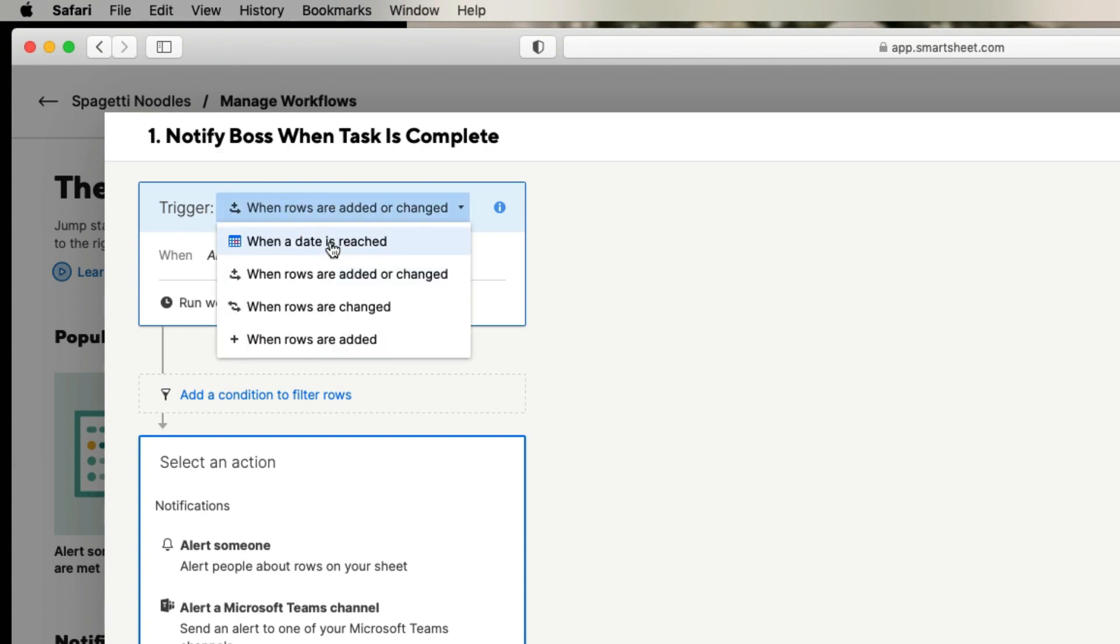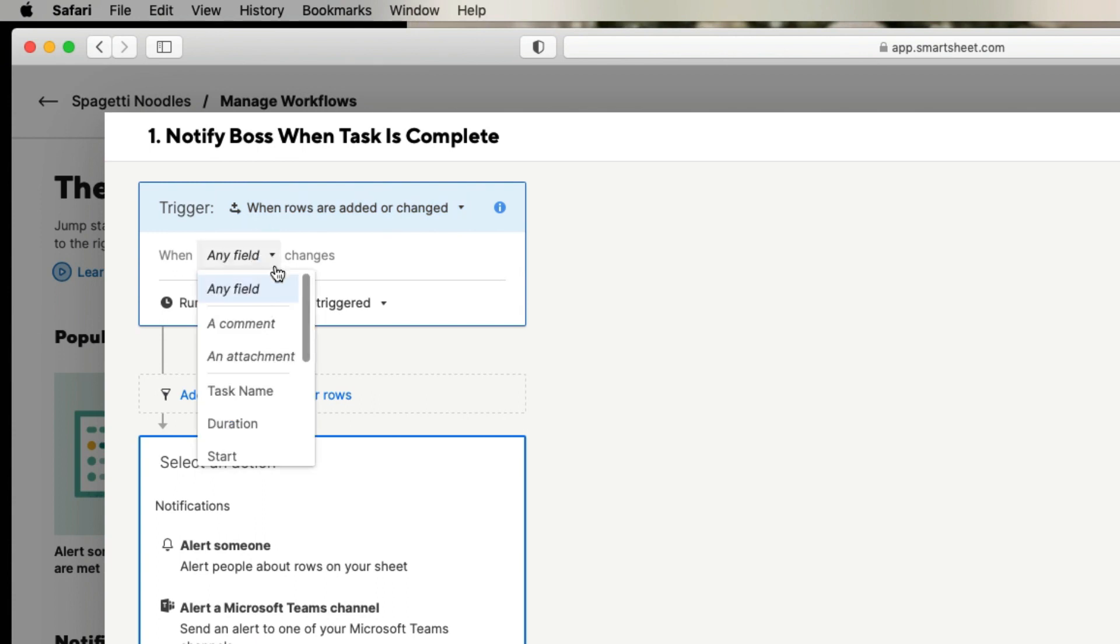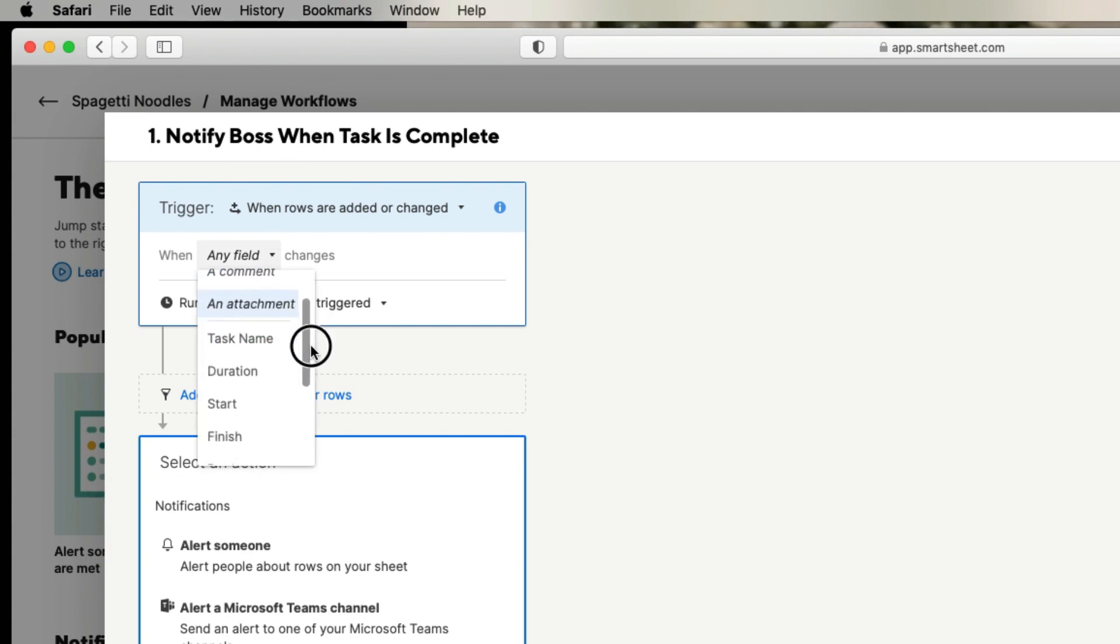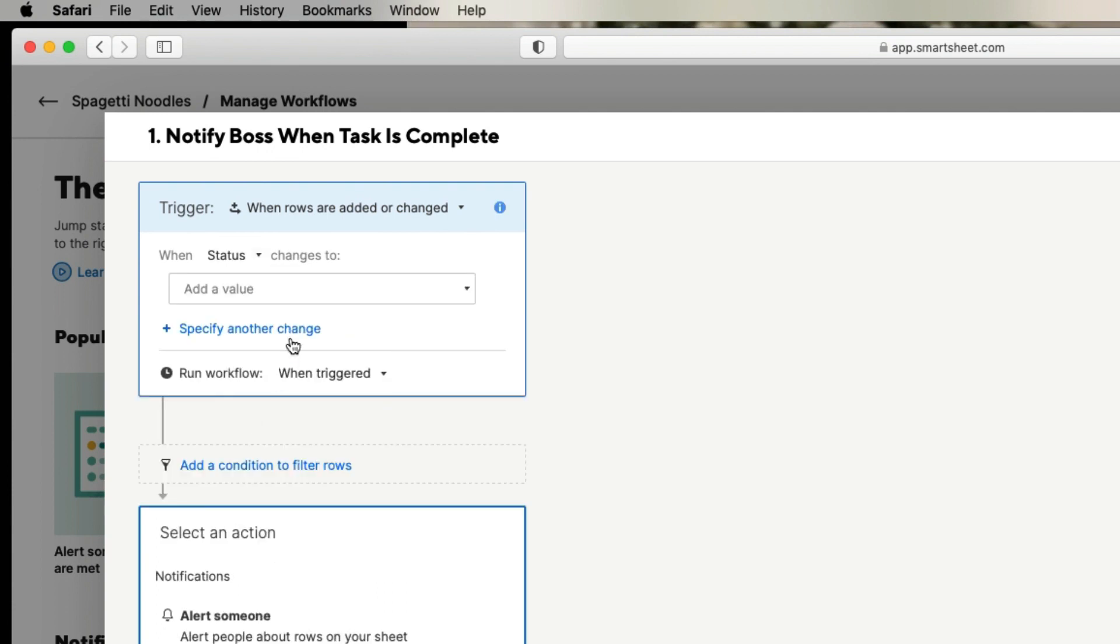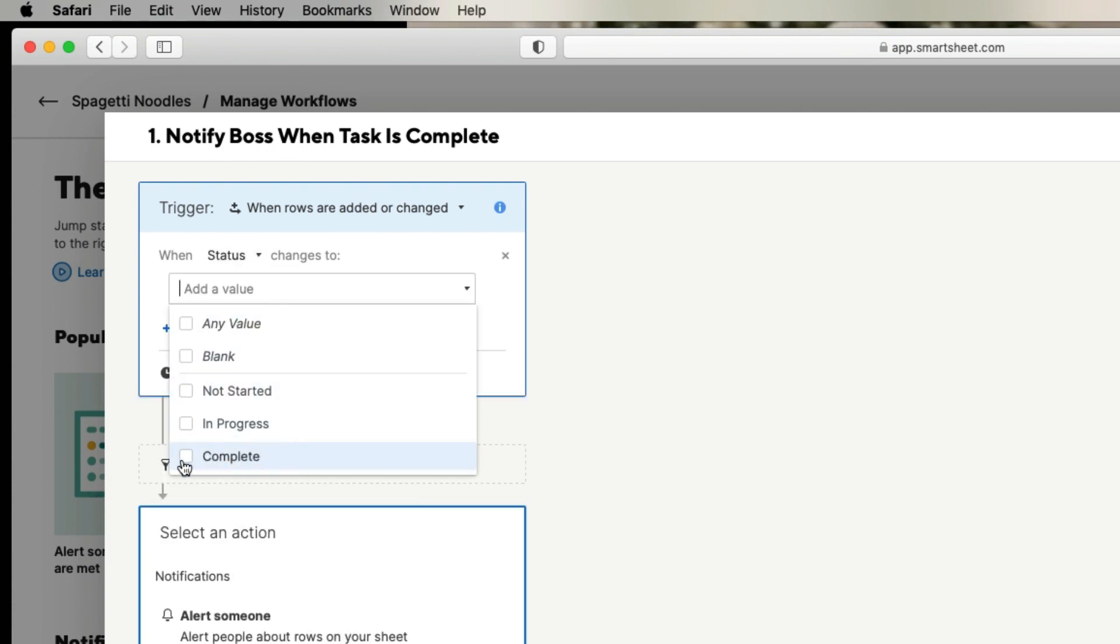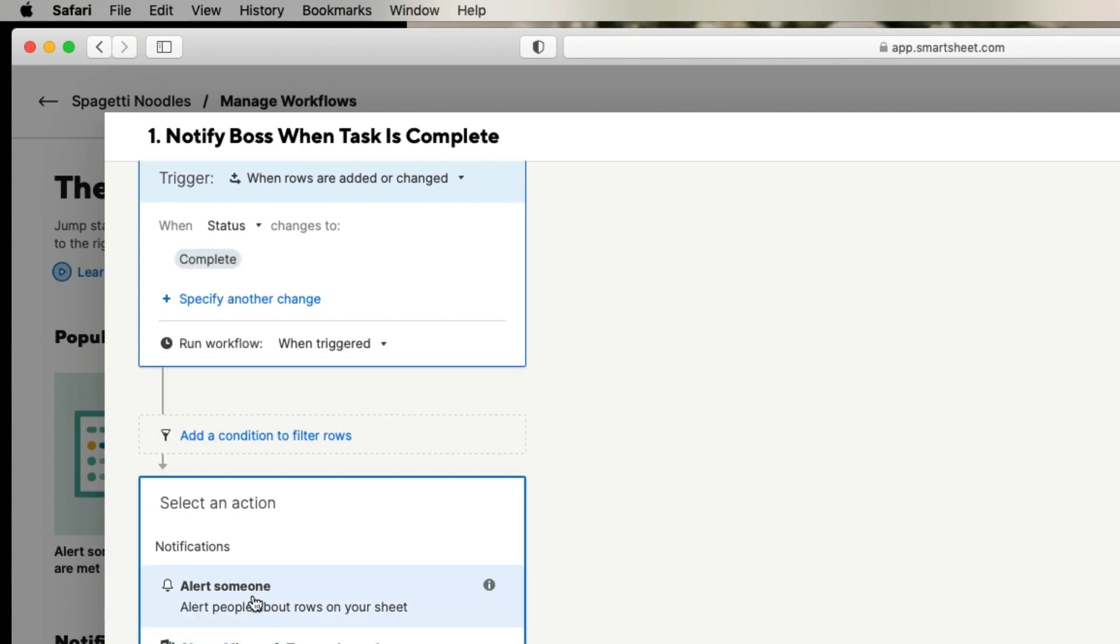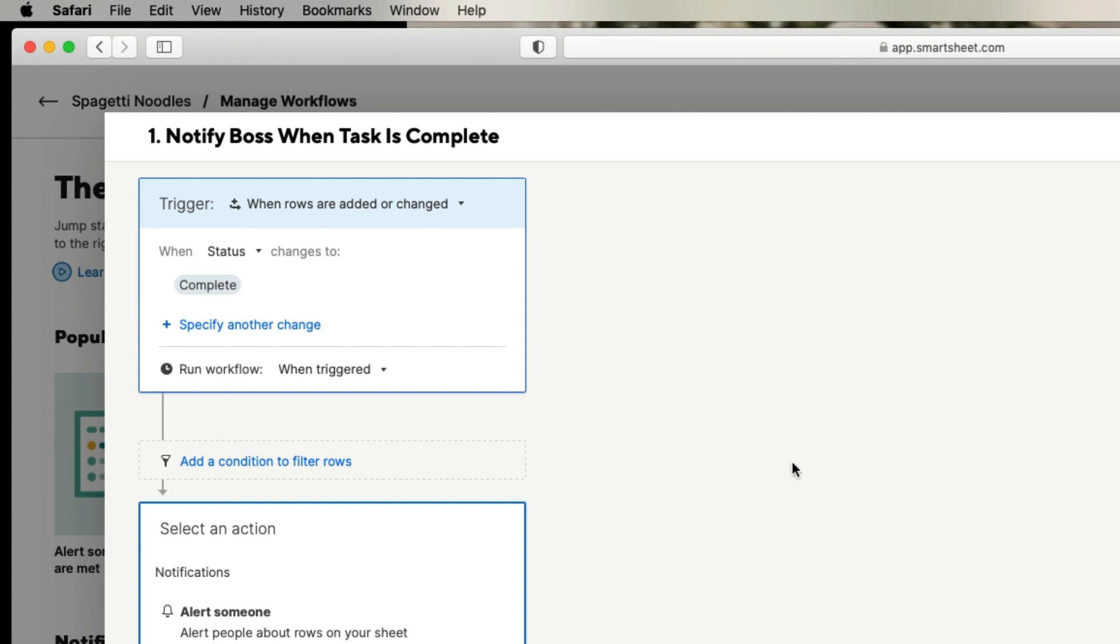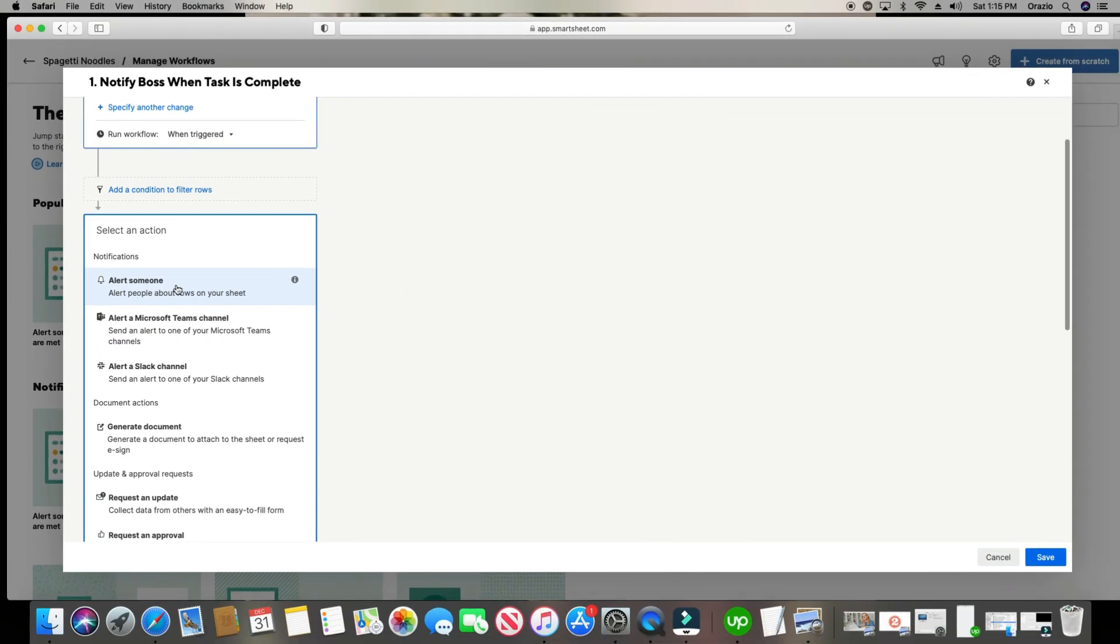So the trigger. We can do when a date is reached, when rows are added or changed, when rows are simply changed, or when rows are simply added. So I'm just going to click this one because it's both when rows are added or changed. The next thing I'm going to choose is which column is going to be the one that triggers it. So I can just say when any field changes. But let's go ahead and do when the status column changes to complete. I want it to notify my boss. So the trigger is when column status changes to complete, then it will automatically alert the boss.